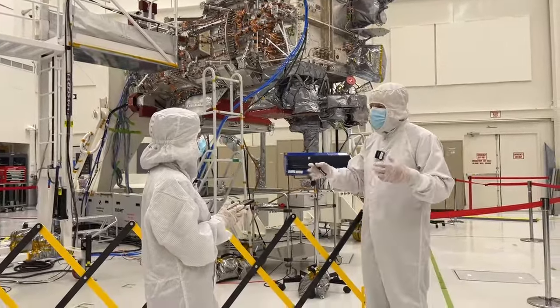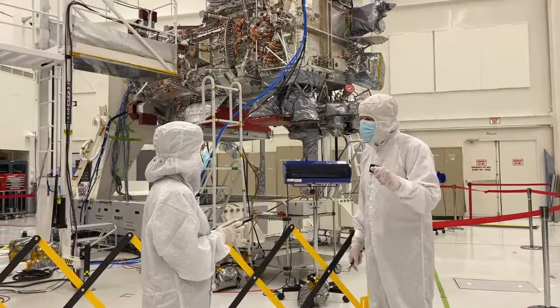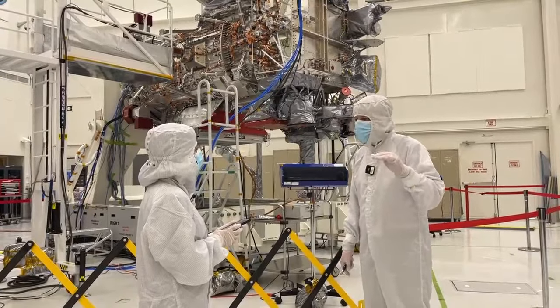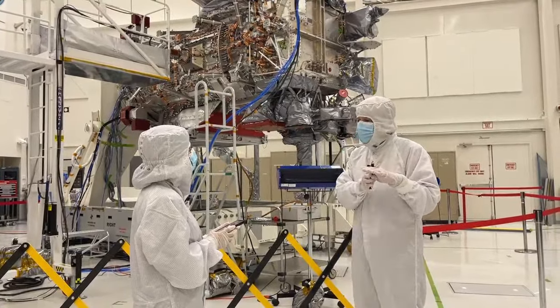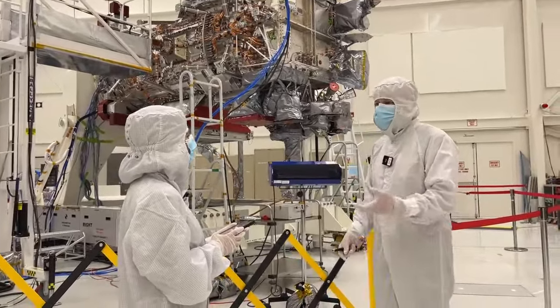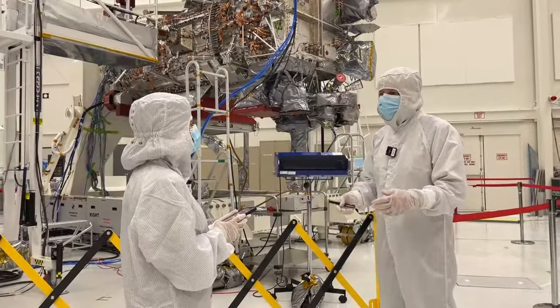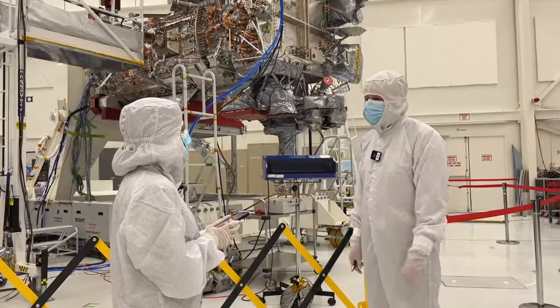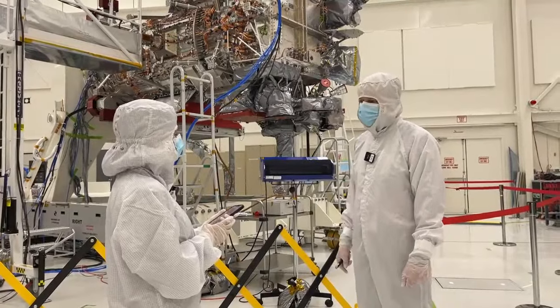So NASA's typical life cycle is when we finish the preliminary design, any new technologies have to reach a certain level of maturity. So at that point, we've locked in the technology. Sometimes we got it wrong and those technologies go south on us. And so we do have to make decisions late. It's typically not to now adopt yet another new technology. It's to regress to maybe something a little less technologically advanced.